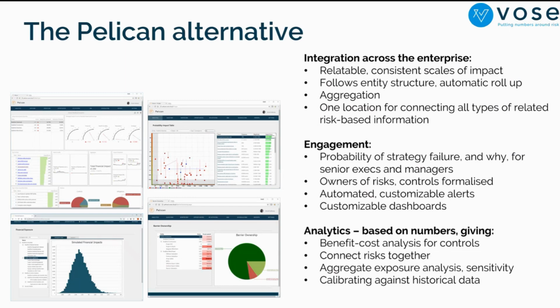It can calculate the cost benefit of the controls you put in place, and optimize the strategy for implementing your control procedures, given that some of the controls can be reused multiple times and affect many places where the risk is being controlled. You can connect risks together and say that one risk is a driver of another risk, and you can create a domino effect. For example, controlling one factor will reduce a great volume of your risks, because a lot of risks are coming from that common factor.